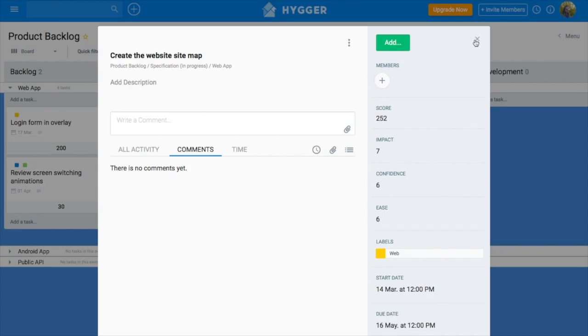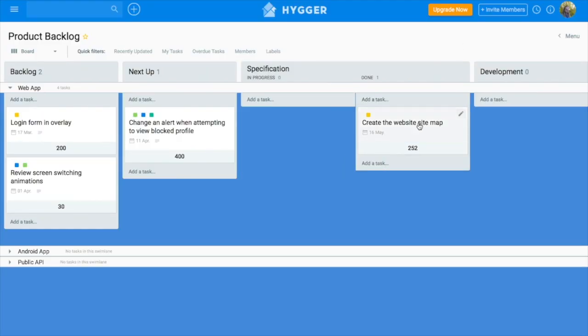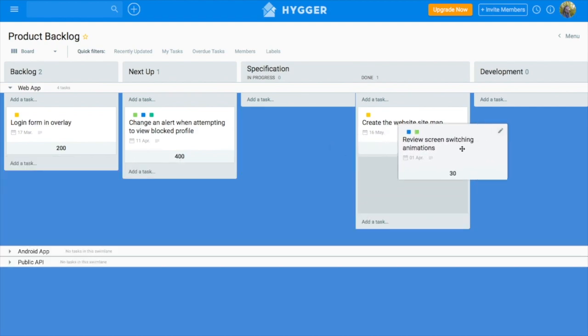When everything is ready, you put the tasks to the done sub-column. When you're ready to implement a feature and to add it as a task to development board, Kanban or Sprint, you add the tasks to the development column.